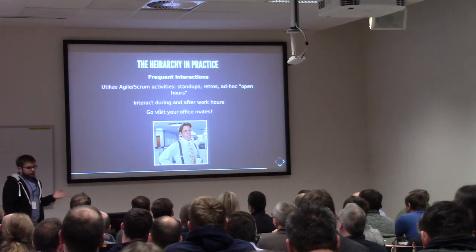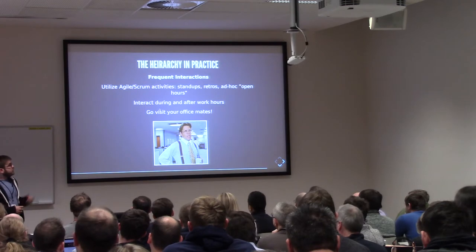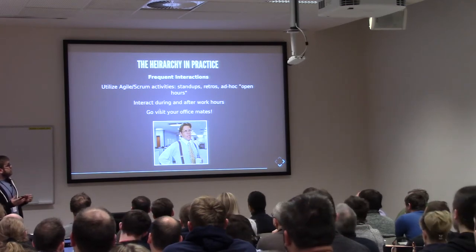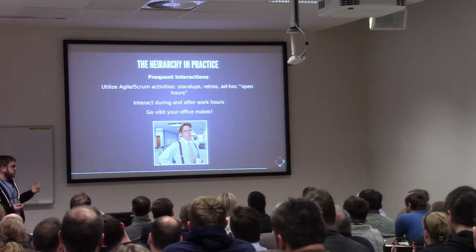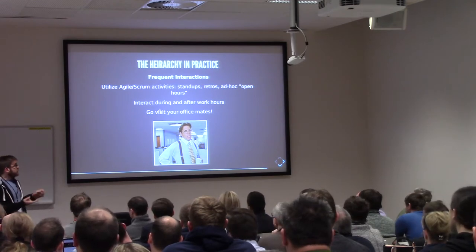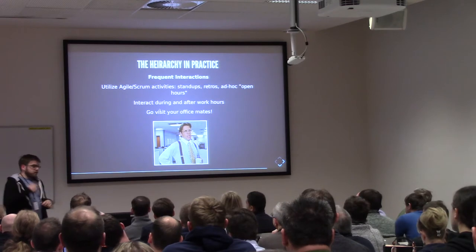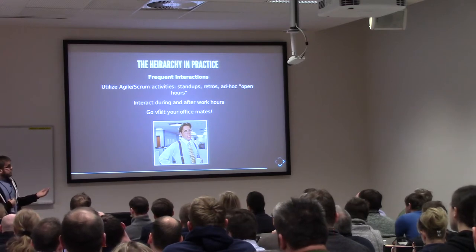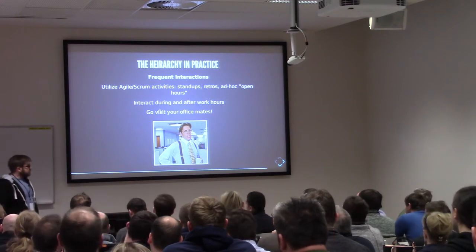So you need to have frequent interactions. In the Agile or Scrum methodology, we use Scrum on my team. We have those daily standups where we talk about what we're working on, what we're going to work on. We have regular retrospectives where we talk about what didn't work, what did work in the previous sprint.